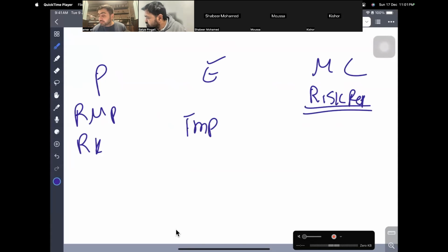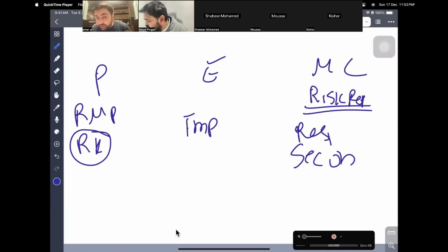us. Plus, we will also see when the response is implemented, how much is the residual risk, the remaining risk that we have, okay? And secondary risk is a result that occurred because of that. Secondary risk goes back to the primary risk. Just like stakeholders, at any time, if a new risk is identified, that goes into the risk register, and we follow the same process for it.